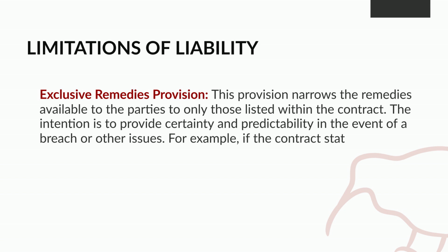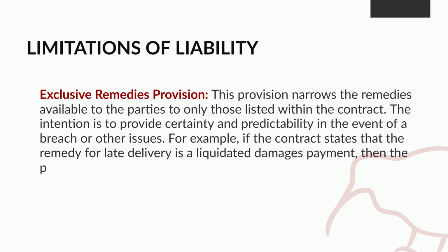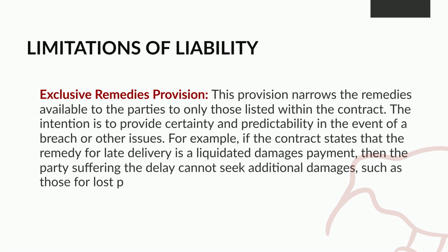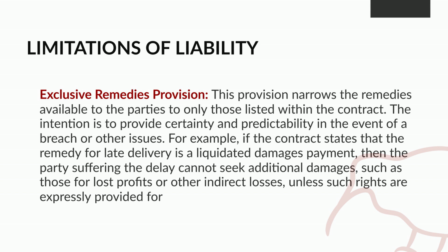For example, if the contract states that the remedy for late delivery is a liquidated damages payment, then the party suffering the delay cannot seek additional damages, such as those for lost profits or other indirect losses, unless such rights are expressly provided for in the contract.